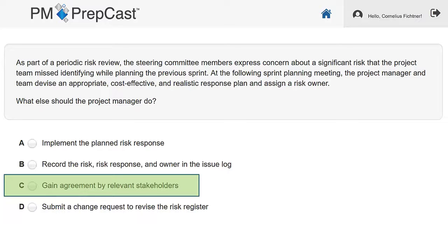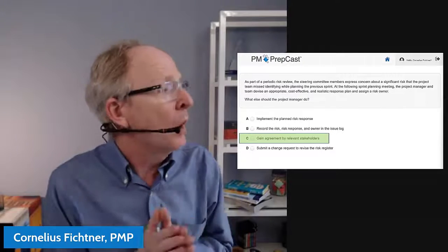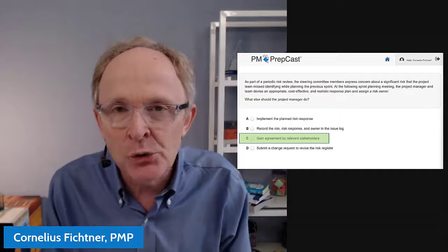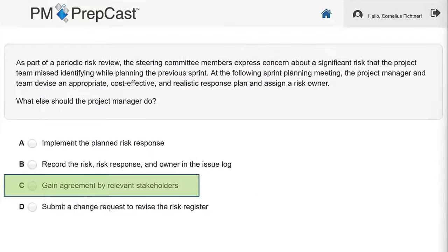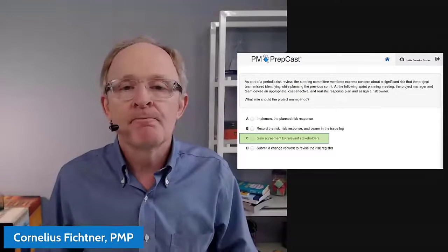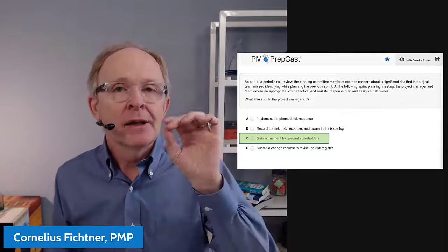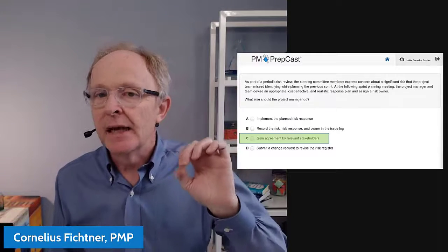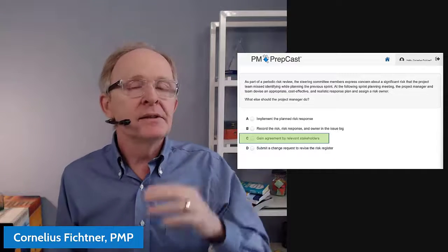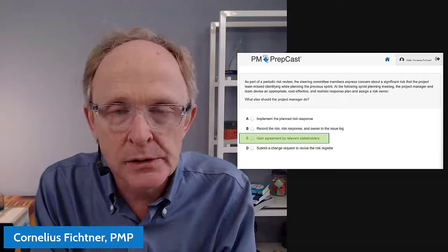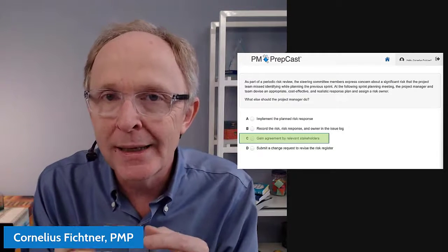Okay, so let me quickly talk about B and C here as well. B was record the risk response and owner in the issue log. Let me bring this up again for you, a little bit bigger. Record the risk response and owner in the issue log. That is incorrect, because if it said the risk register, it would be correct. The issue log is not where you record a risk. That's where you record an issue.